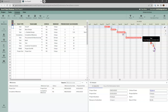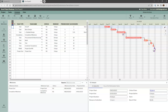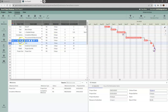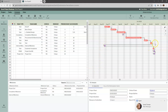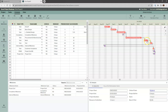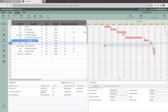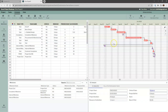There's another type of milestone: an internal milestone. I'm going to place one here — maybe for the test folks who do the testing and final validation after we build or assemble the product. We want to give them an indication of when the product will be coming to them for testing. I may want to place an internal milestone between build and test to give that projection.